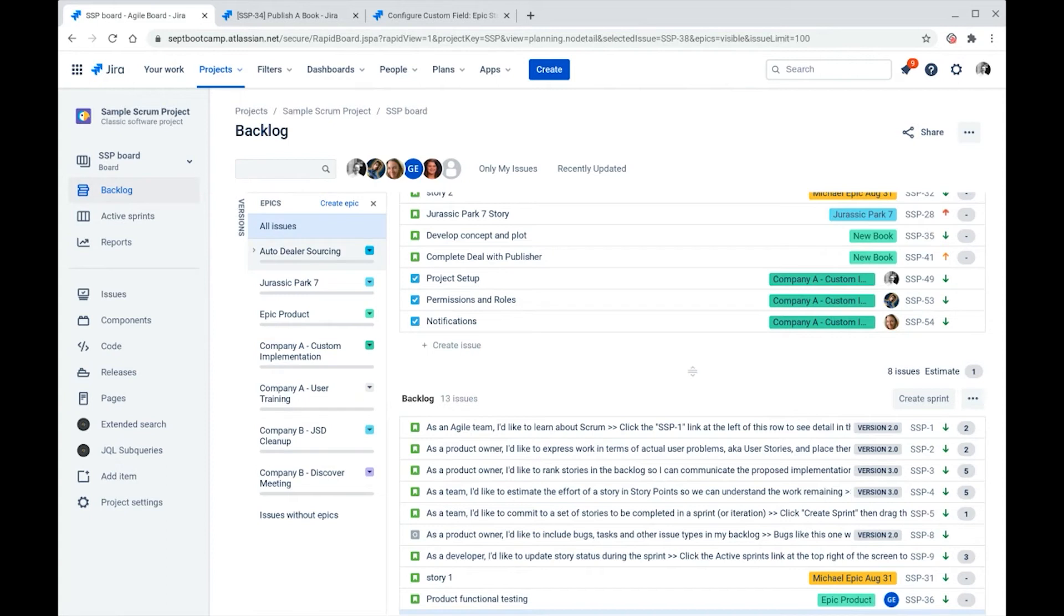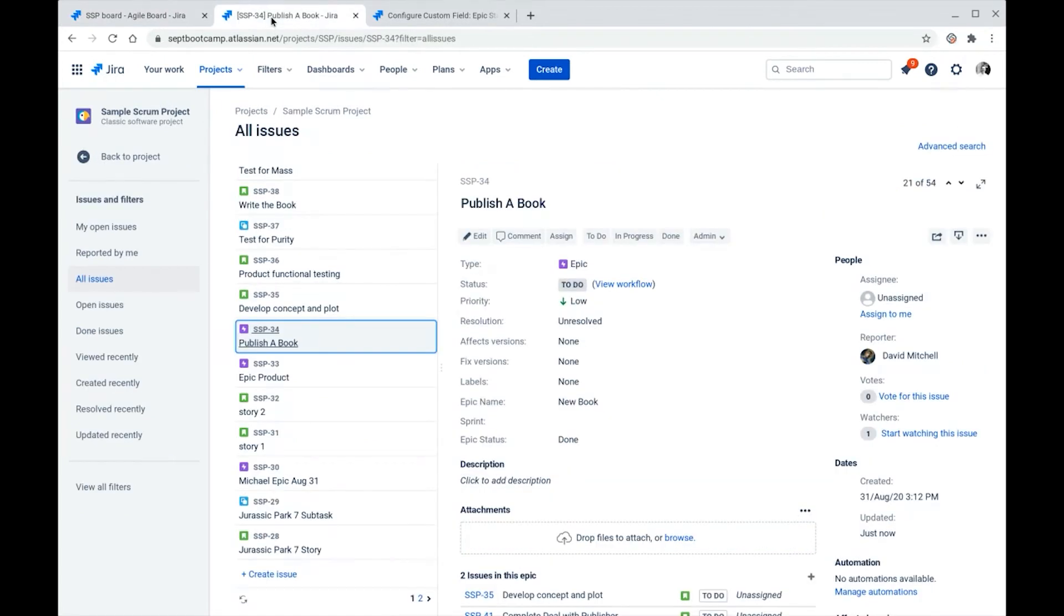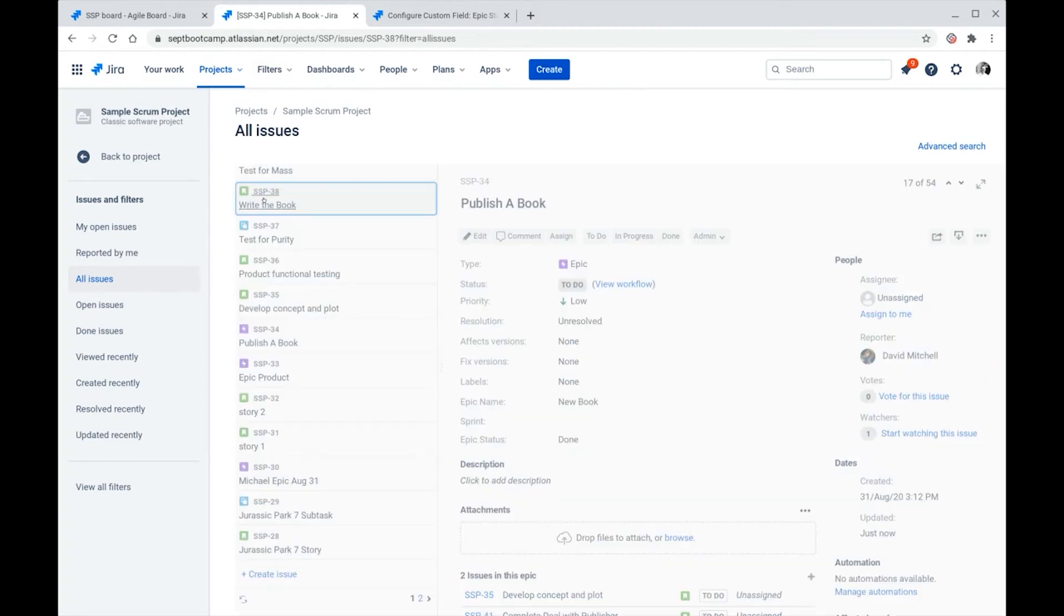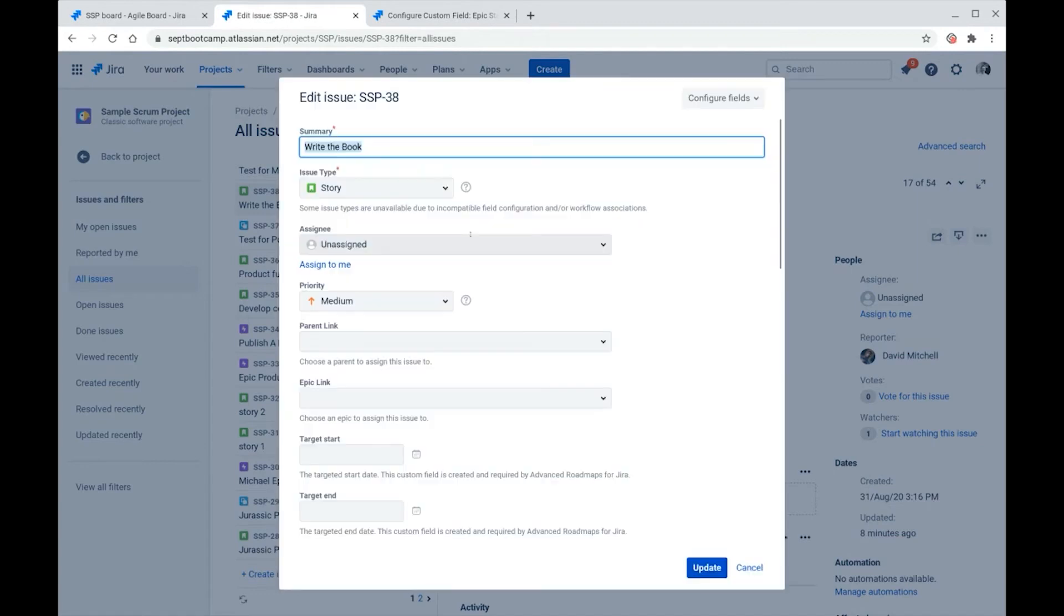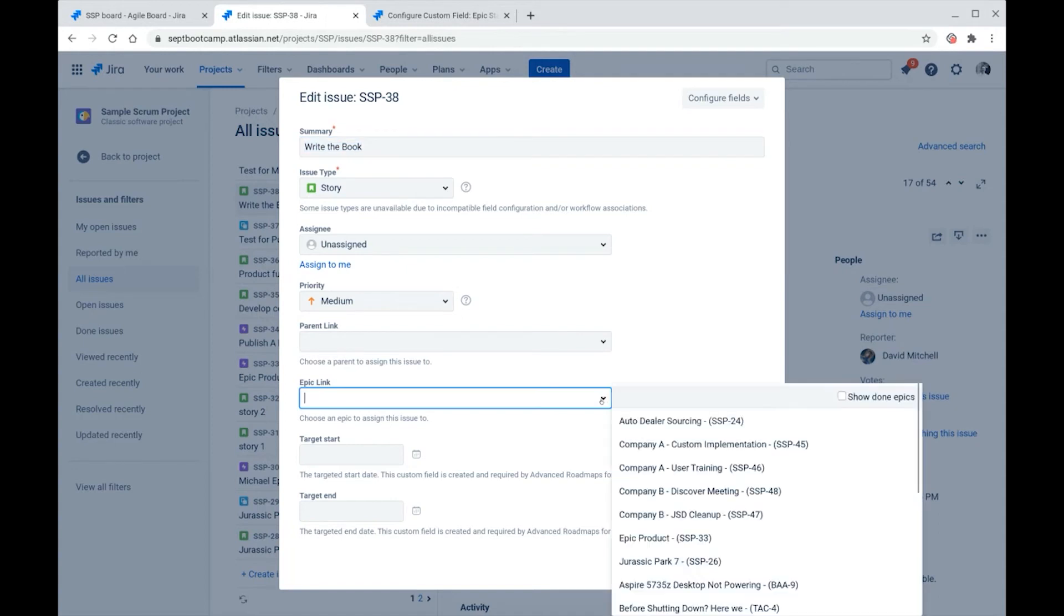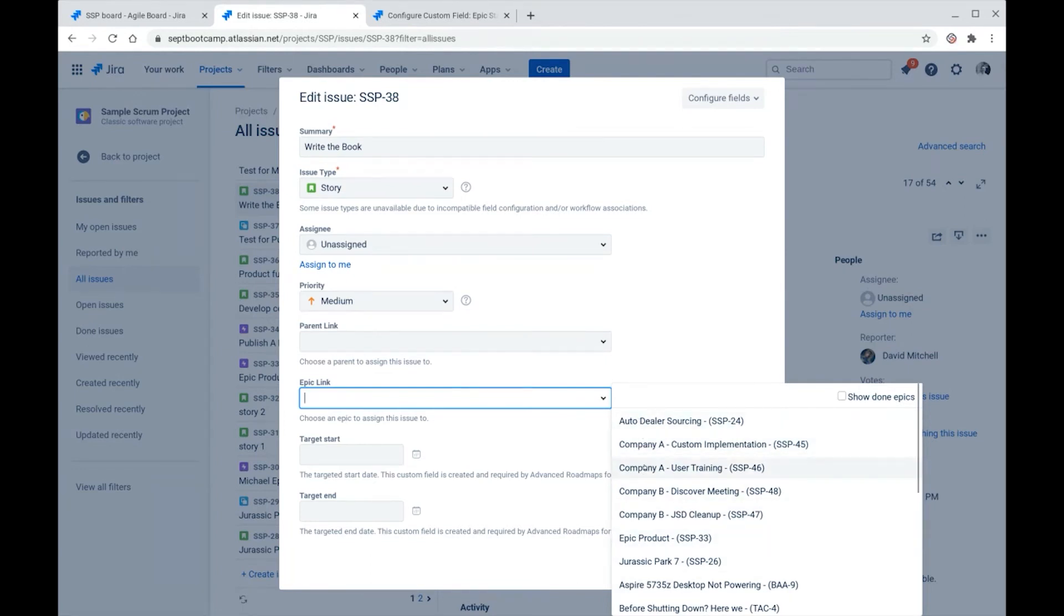The other thing that changes is that the epic will disappear from the drop-down list in the epic link field. So let's have a look and see what that looks like. So let's look at a story that has an epic link field on its edit screen. So as I go down to the epic link and I go to the drop-down list, we see that that New Book epic does not appear in the list of epics to link this story to.